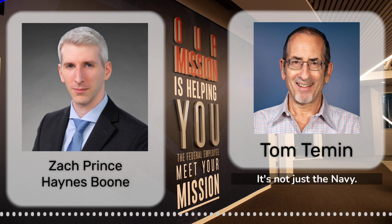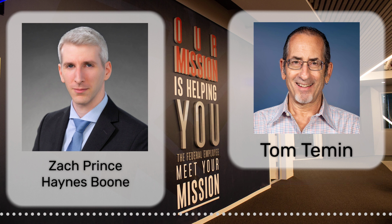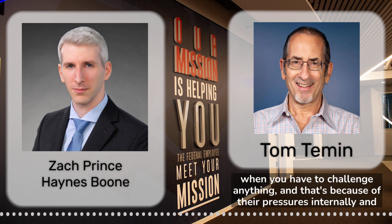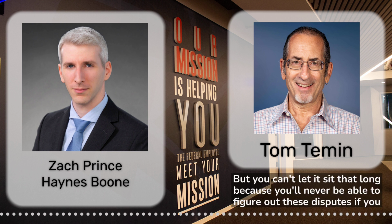It's not just the Navy, it's everyone in DOD and certainly everyone in civilian agencies. I'm seeing, and have been for years, rates getting trued up at the very end of the 6-year statute of limitations, the window when you have to challenge anything. And that's because there are pressures internally and there's backlogs, and totally get it. But you can't let it sit that long because you'll never be able to figure out these disputes if you wait that long.